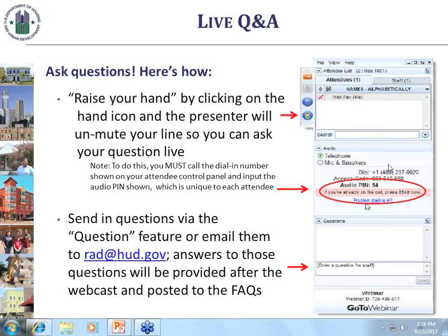So you're converting this, whatever project it is, to RAD. RAD does not impose any reserve requirements per se. Just help me out here, is it a new construction or is it rehab? Let's say rehab of an existing building, because that's more likely what we would do. Okay, so you're going to do a rehab of an existing building. As a result, we're going to require you to do a physical condition assessment once you get an award that is due within 90 days.